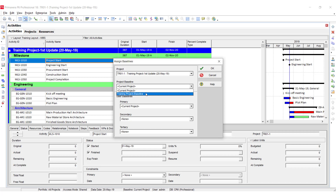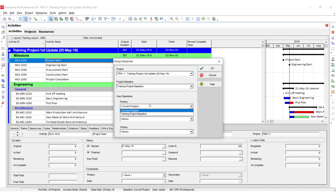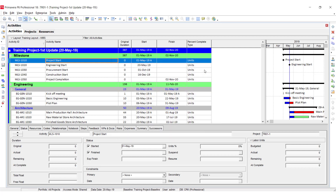I am going to select the Training Project Baseline as the project baseline, and the primary baseline is Training Project Baseline. If you have more than one baseline you can select secondary and tertiary, but right now we have made one baseline. Click OK — now the baseline has been attached.